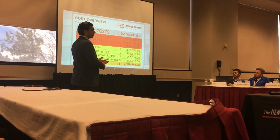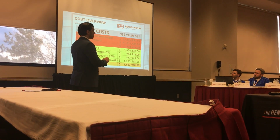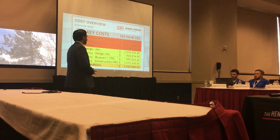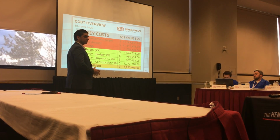This is an OSHPD job. It is design build. It is something that we haven't recently done before, and it is also one of the first times we want to make an impression on this owner. So to have that contingency of 4%, about $1 million and some change, is reasonable. So those are our key costs.